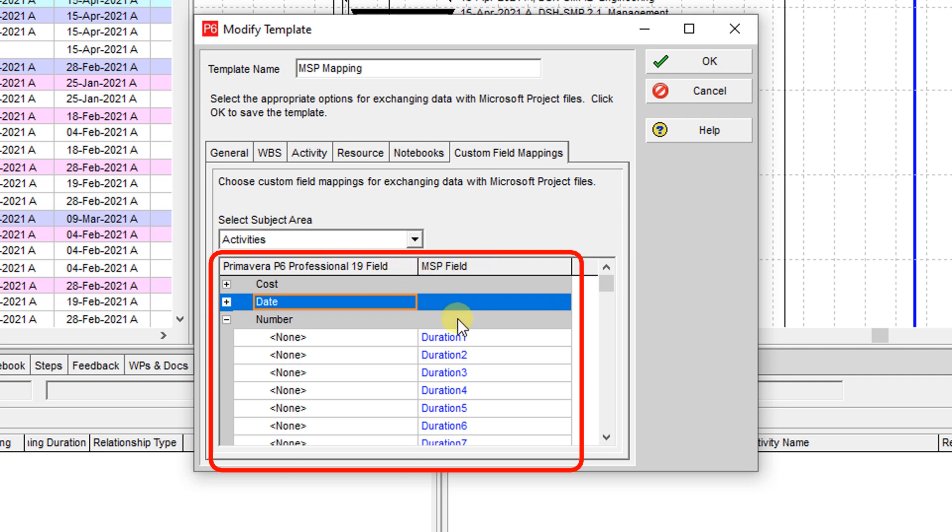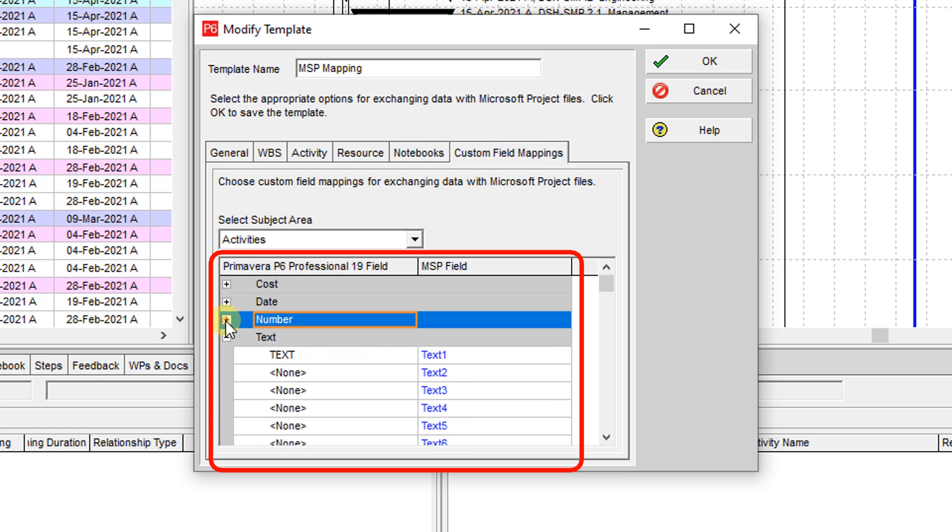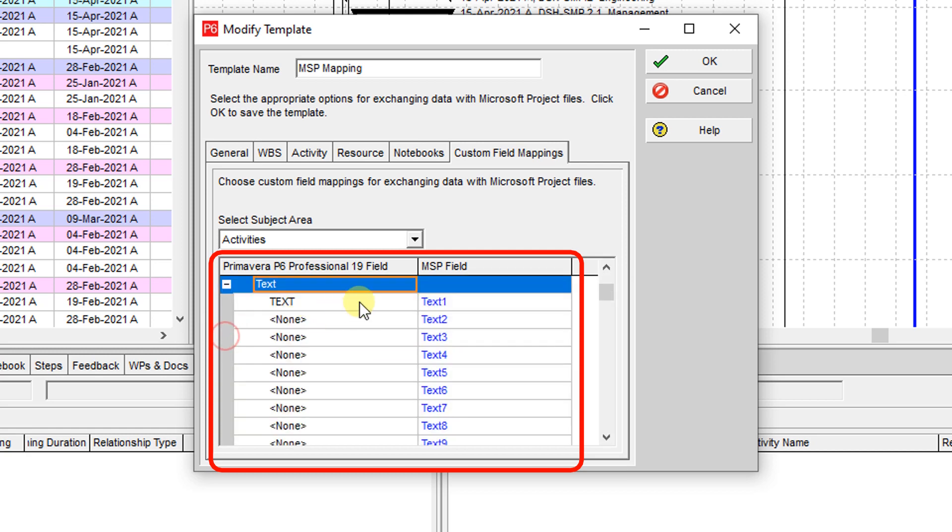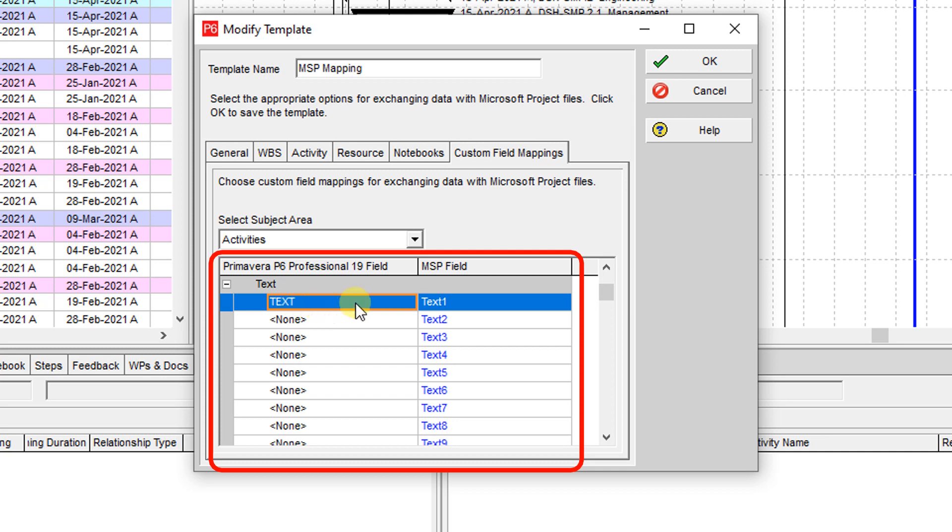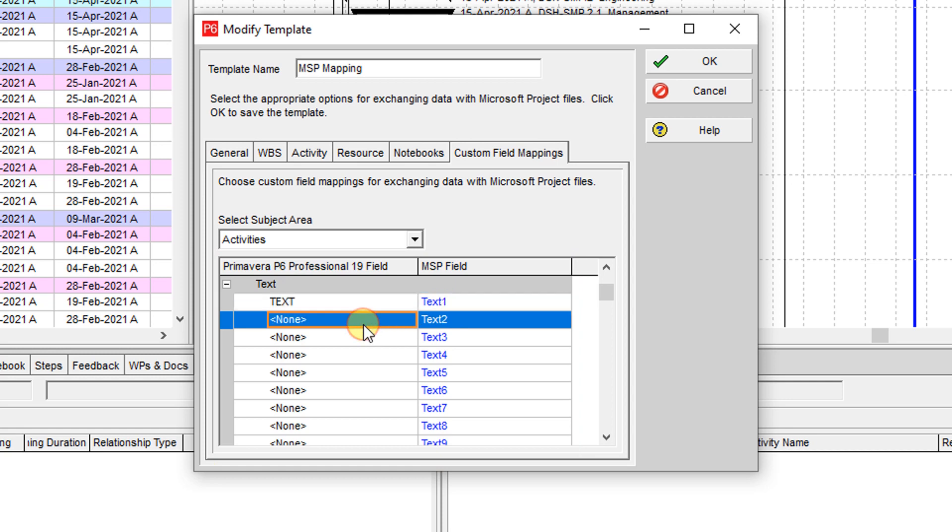If you want to map some numbers, some dates, some text, for instance what I have on the text will be loaded to the Microsoft Project text field number text 1. It is mapped, but if I have anything else on the text 1 for instance in P6, it's not be uploaded here.